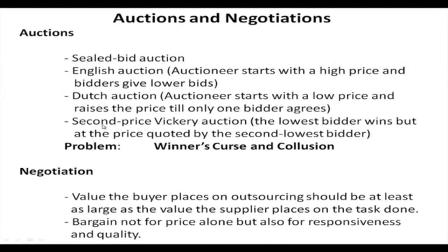The second price Vickery auction addresses the winner's curse: the lowest bidder wins but pays the price quoted by the second lowest bidder, not their own bid. Another problem that occurs during auctions is collusion among bidders. There are several mechanisms to address collusion, though time is insufficient to discuss them all — these are different ways through which auctions can take place.